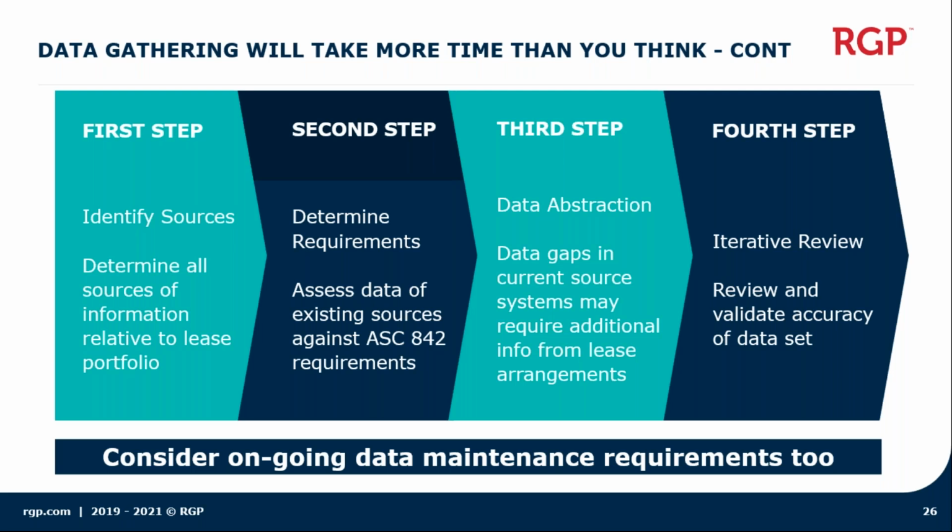And then lastly is the validation component. That is two-phased. One is validating the data before you upload it, and the second is reconciling it once it has been loaded into the platform to make sure everything has been uploaded correctly and that it all is in the correct format.